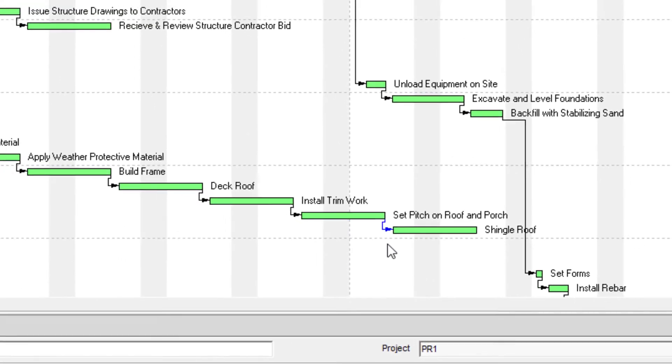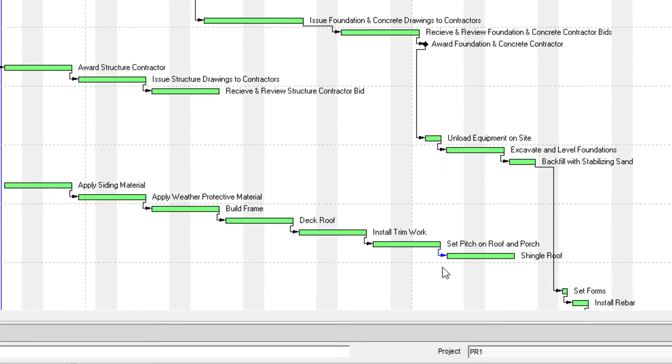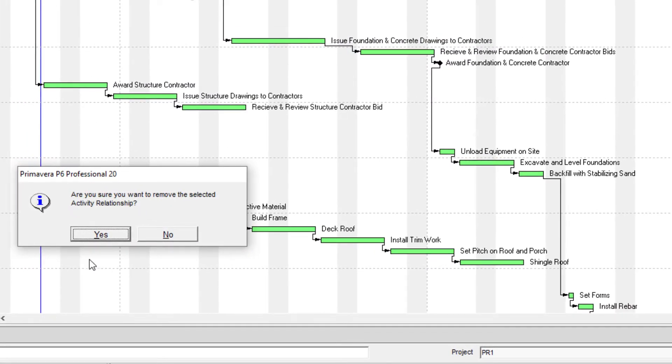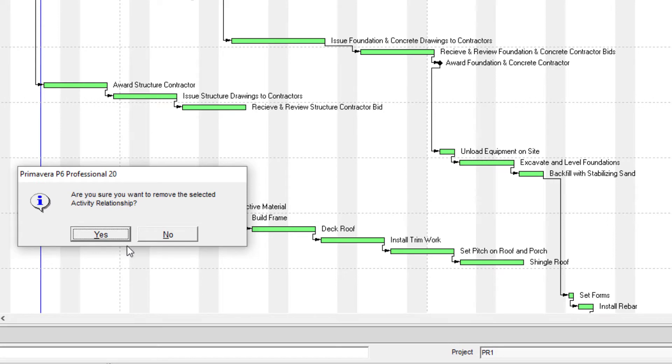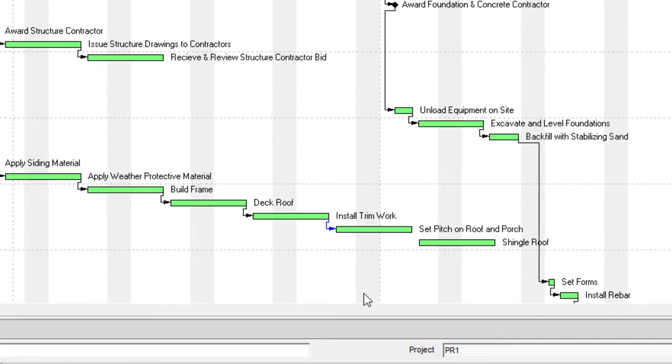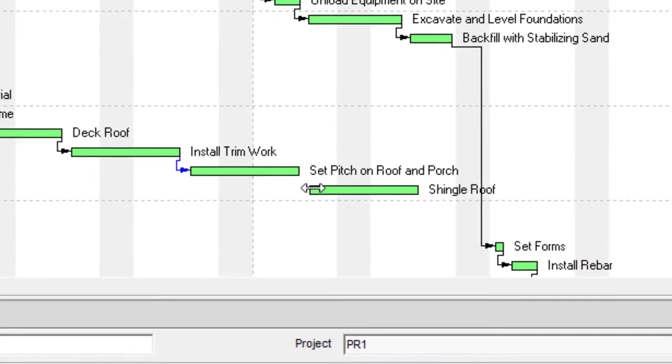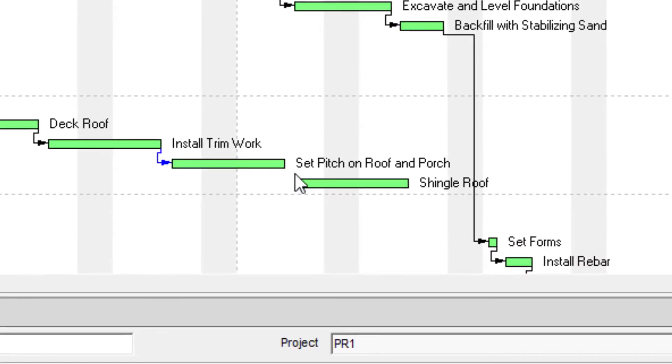So on our keyboard, we can just press delete. And we see that yes is already selected. So we can press enter. And so we see that that relationship between those two activities is gone.